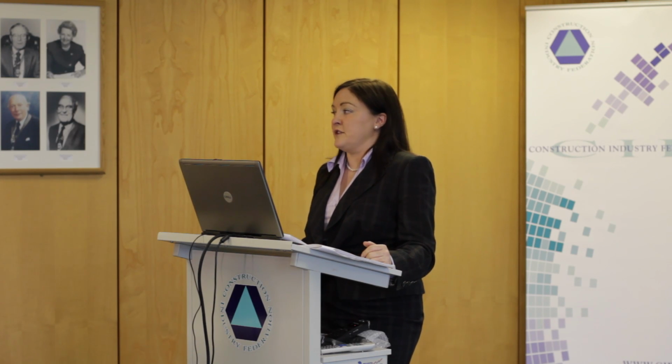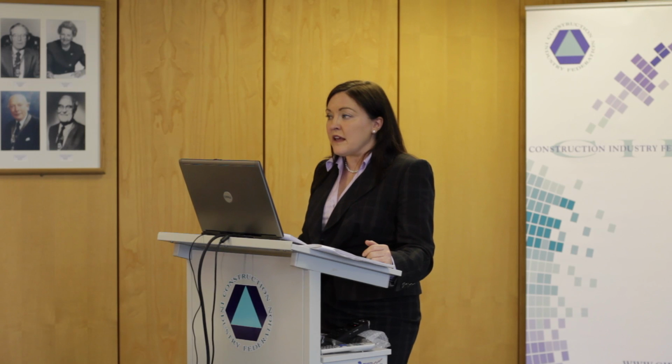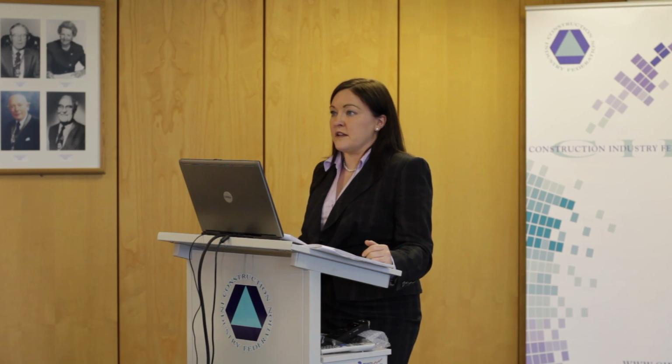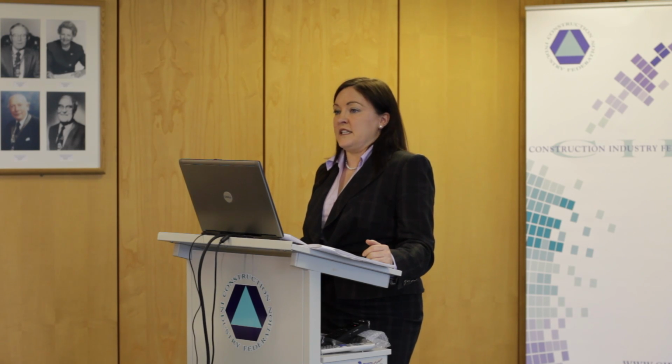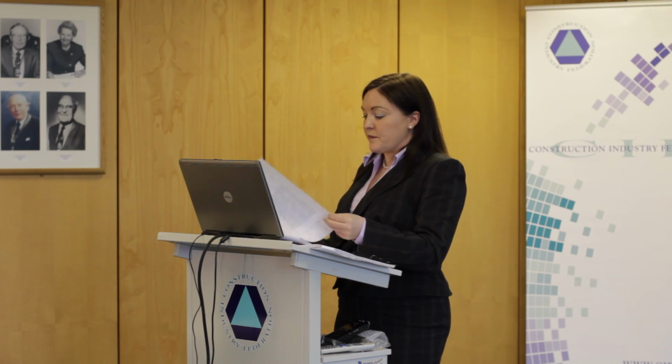If you think you're entitled to it, or if you think you're entitled to anything, I mean, I have several, and that's why I don't want to argue against myself here, but I have several live conciliations over the defect certificate where the contractor is years later saying, but he should have issued it. And I said, but you didn't say anything at the time. Write it. Say you should have issued the defect certificate at this stage, because it becomes a claim.